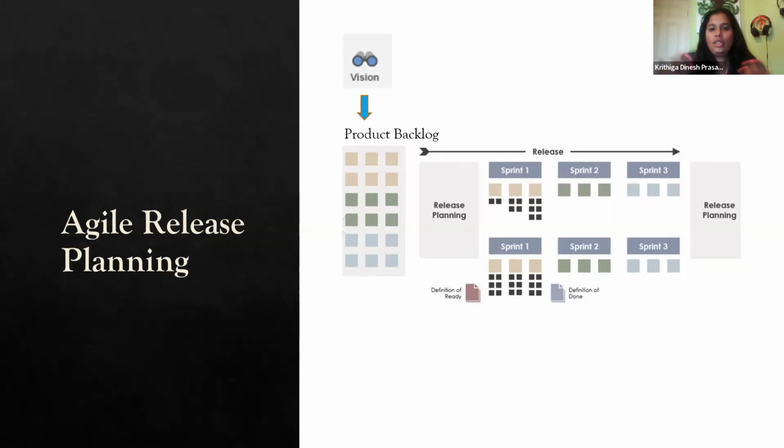In some organizations, it could be a single plan comprised of all software projects, but for a DO-178 project, depending on the level of the software, you need to have a set of plans for your particular software project. So then my epic would be, okay, create a PSAC for this system, and these are the inputs. This is my acceptance criteria. Your acceptance criteria for that epic could be that my PSAC is reviewed by a peer reviewer or software manager, and moves to the next level of review, or submitting a draft to the customer. I'm just giving an example.